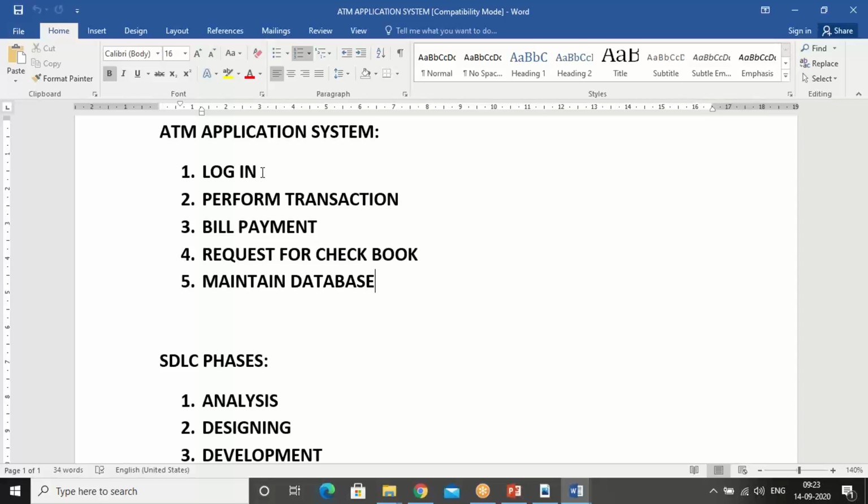This is decided based on the average of the requirements. Now let us say sprint 1, that is login, we decide as 10 days. We have to complete this sprint 1 within 10 days. In this sprint 1, we are going to have items. In login, we have to create a user ID, which is one item. You have to create a password, which is one item. You have to create a login button, which is one item. So in total there are 3 items, and we have to complete these 3 items within 10 days.